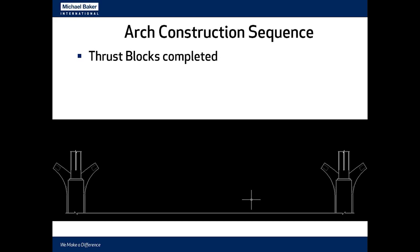Our solution was to post-tension the arch incrementally during the construction sequence to block in beneficial prestress moments before the arch became fully fixed.